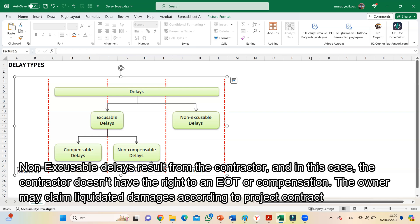Non-excusable delays result from the contractor. In this case, the contractor does not have the right to an EOT or compensation. The owner may claim damages according to the project contract.